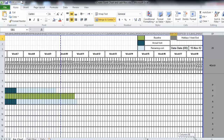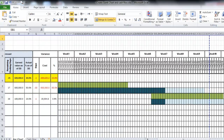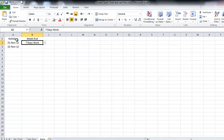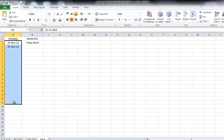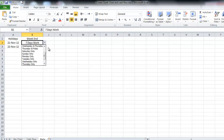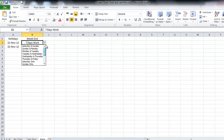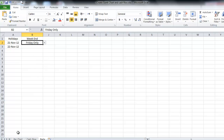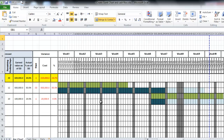To start using this Excel sheet, go to the data tab and identify your holidays here, because this sheet is based on working days calculation. Just identify your holidays and choose which weekend is off in your schedule — you can choose Friday, Thursday, one day per week, or two days. For example, if we choose Friday and go to the Gantt chart, we'll find the Friday column highlighted with the holiday color.